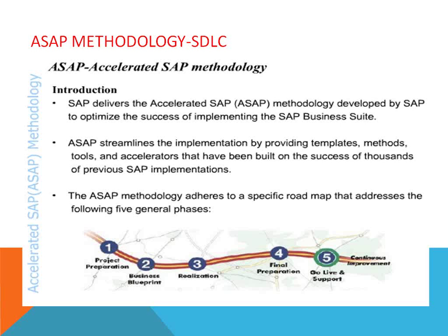Once the testing is done and the defects have been removed, the system will go for go-live, and the go or no-go live date is decided. Based on this, SAP also provides another built-in solution called Solution Manager. Based on the Solution Manager and all the documents, we cover project management, document management and system integration. So the Solution Manager takes care of all the details, and this way the solution is delivered, and then the date is decided for moving from the non-SAP system to the SAP system.